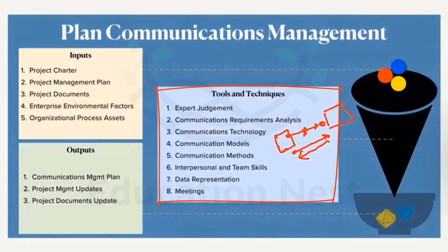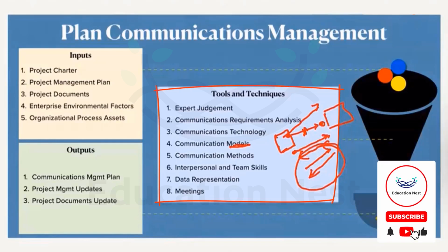But the main thing to focus on here is the models, whether it is single-directional information or interactive communication. What can be examples of single direction? You might have seen many promotional emails, brochures from the vendors, or event-related emails that we get from HR. All these are one-sided information. We cannot give any reply back to them. But when we speak about two-sided communication, we can talk about the daily email exchanges about work statuses, about the project work, or anything that has information from both directions, right? So these are the two major communication models that we have to learn.